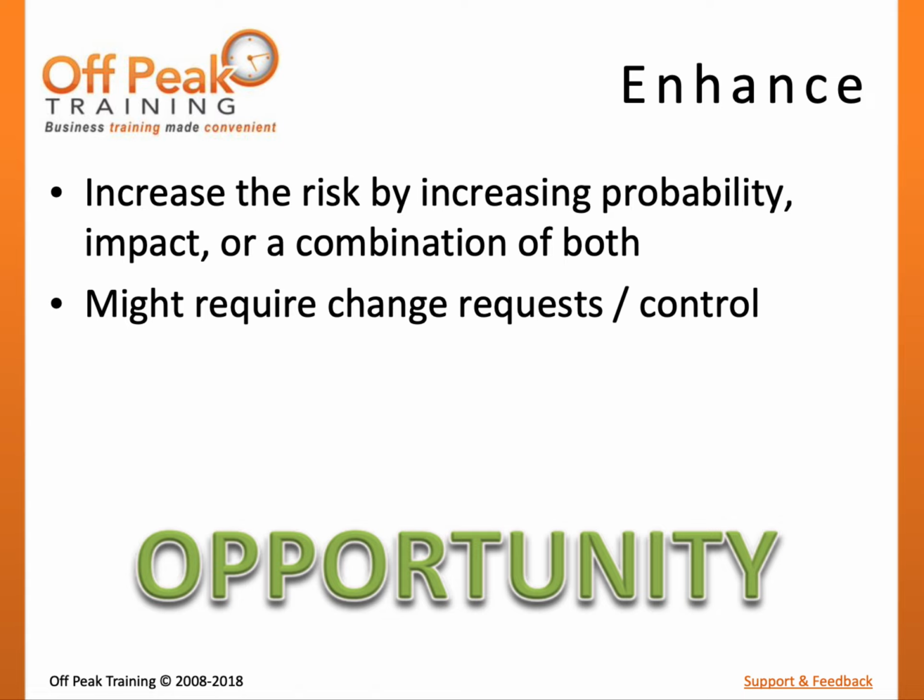For example, if we identified the opportunity to purchase land cheaper if a new zoning law goes into effect, we could either try to lobby more individuals to vote in favor of the law, or we could lobby to increase the amount of the incentive. In both cases, we would be enhancing the opportunity.